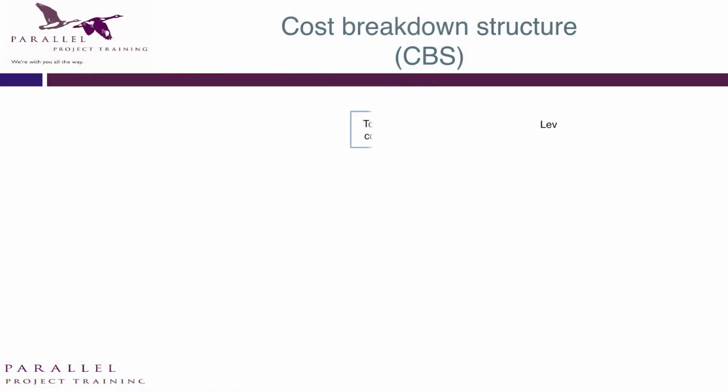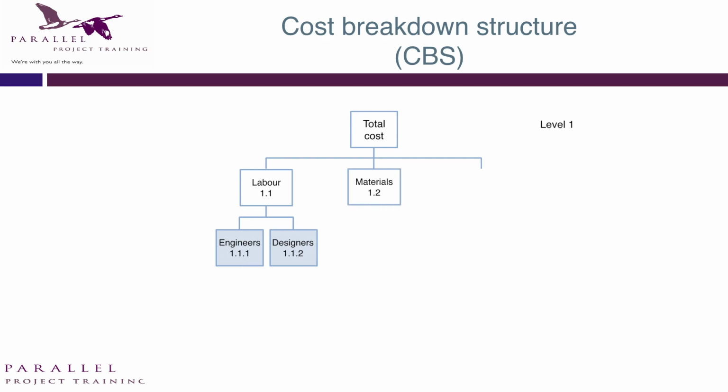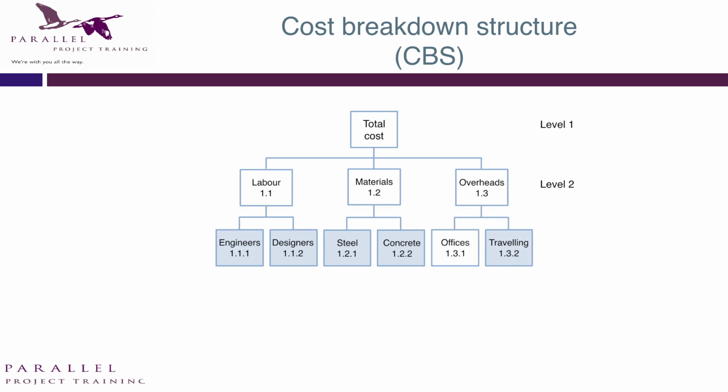Finally, people are going to ask how much is it all going to cost? So how do we price up the job? Well, we've got different cost headings that we're going to use. So labour, effort, so that's usually the amount of designers or construction people that we need to do the project. Materials, material is something that is left in the project when you finish. So steel or concrete or paint or carpets or equipment. Overheads, well, that'll include things like overheads in terms of heating and light in the project offices, but also travel and subsistence overheads, things that are consumed in the development of the project.